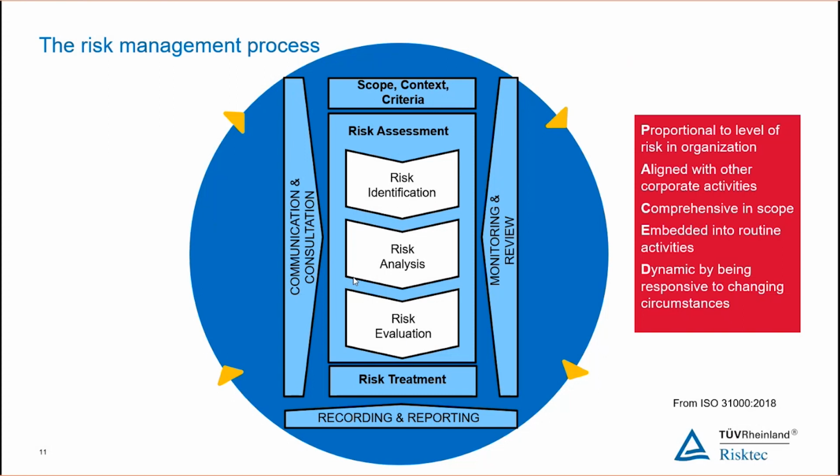Now, this risk assessment part, you can see there's three key parts to that. The risk identification, what have we got? The risk analysis, how bad can it be? And how do we manage it? And then risk evaluation, is that actually good enough? Are we meeting our objectives? Are we doing a satisfactory job of managing those risks at that point? And at the end, then that gives us, given the knowledge that we have in place, the ability to be able to treat those risks. Can we make those any better?